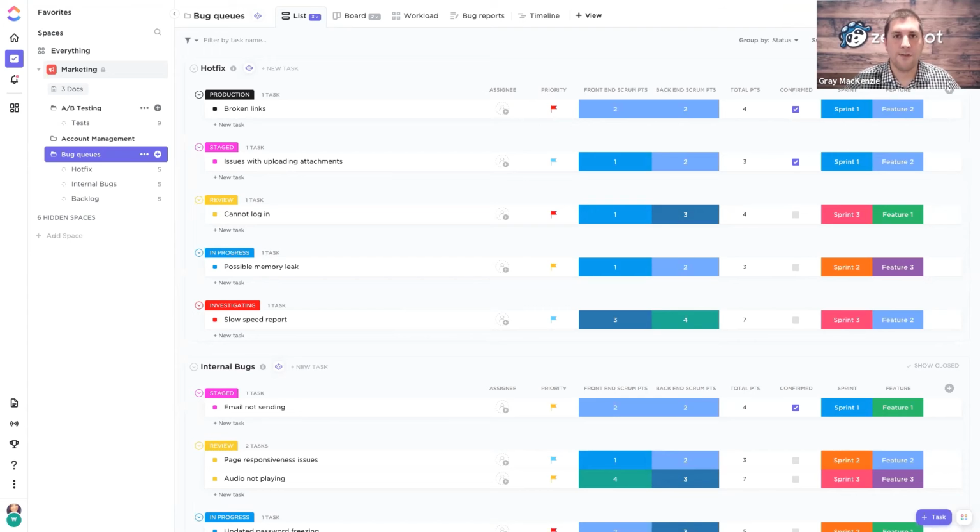that task has all the instructions for setting up that account in ClickUp, how to pull from your template your entire client folder and set up the tasks that need to happen in there, how to assign the team, how to add them to the account dashboard, and what data gets added to the account dashboard. Actually, a lot of times that Zap or Integromat scenario will automatically just create the account on the account dashboard for you inside ClickUp.